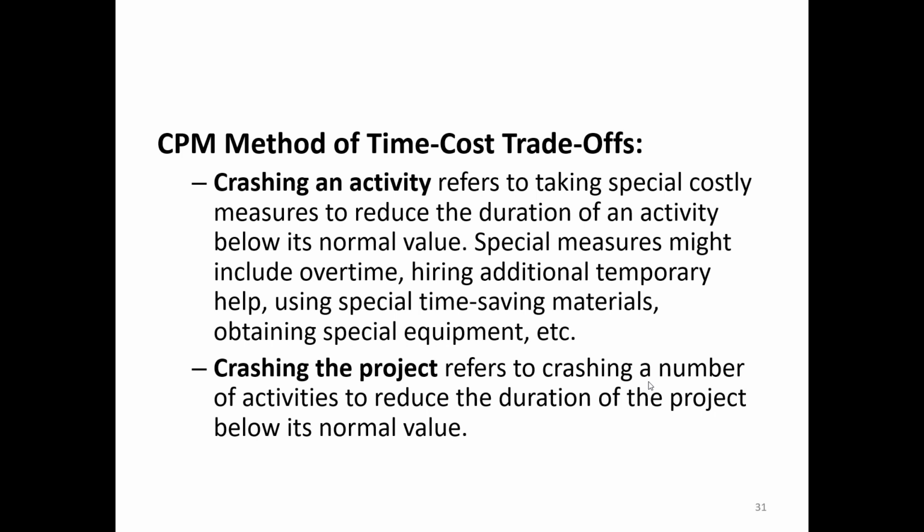Same kind of idea with the project, except we're now looking at a set of activities, a selection of activities that we're going to reduce the time of, with the idea of reducing the time that the overall project takes. So same kind of goal, but crashing the project refers to a selection of activities, not necessarily just one activity.